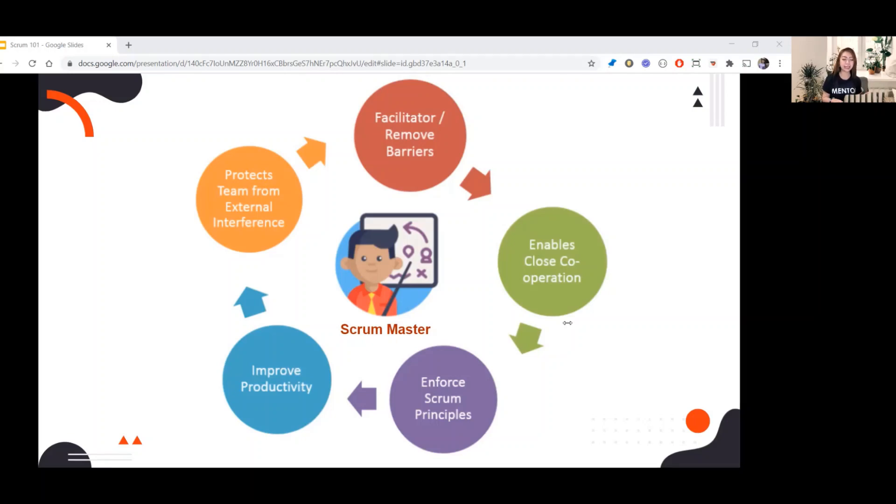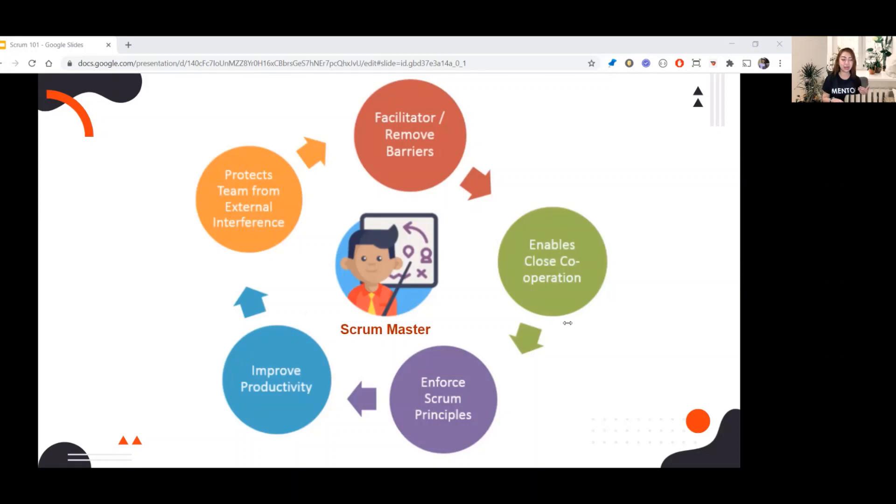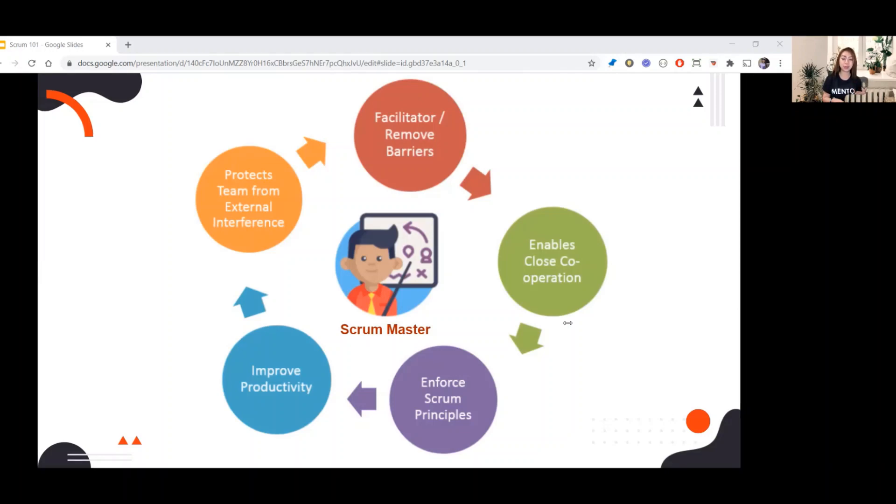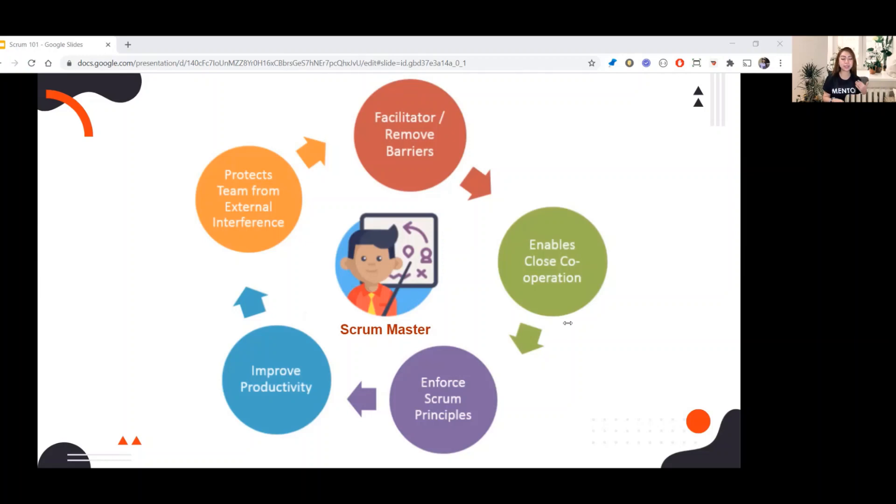Next, protects team from external interference. For example, when stakeholders directly communicate to the developers and give tasks to them without consulting the PO and the Scrum Master. In this scenario, the Scrum Master should protect the team by communicating with the stakeholders that everything the developers will work on should be based on the result of their sprint planning.